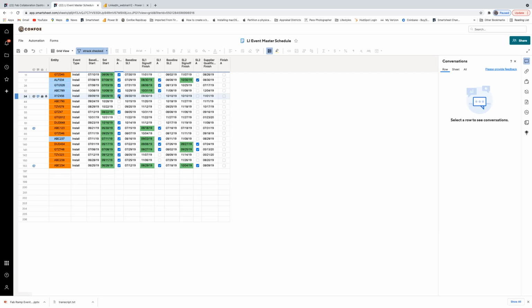Typically what you see is everything is green at the top, with, at an angle going down, showing the newer ones just starting and so on. But again, this is just example data. And so as you actualize these, then they're actualized in the system, and the equations that we have in the sheet will then go ahead and give you your performance compared to baseline numbers at each milestone. So that's the most simple way to do it.